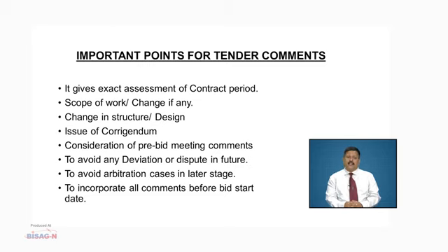It is ensured that all these points are covered and a single corrigendum after the tender presentation is made so that it minimizes and resolves all the issues pertaining to the tender. It is also advisable to have pre-bid meetings and comments for higher tenders. This also gives us a chance to avoid any deviation or dispute in future, to cut down and minimize the points which lead to arbitration cases at the later stage, and it incorporates all the comments before the bid start date.